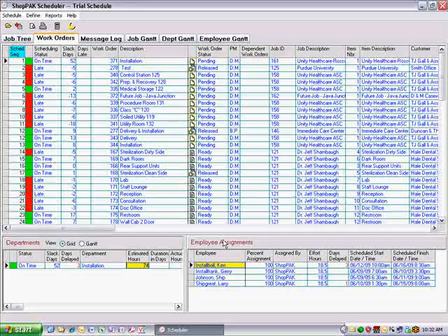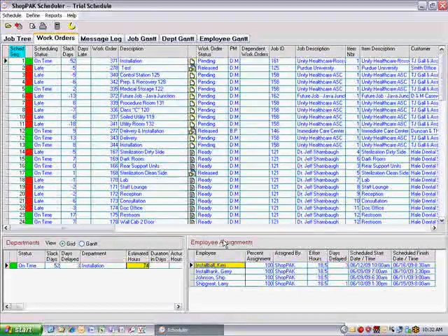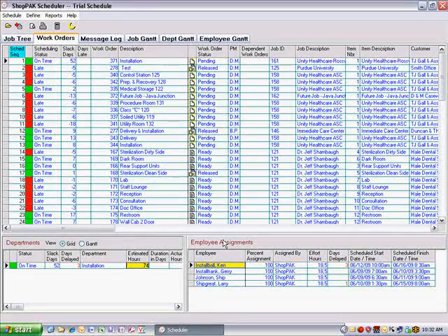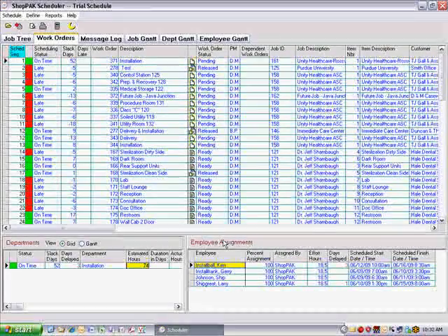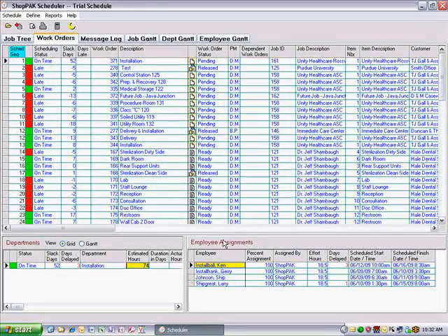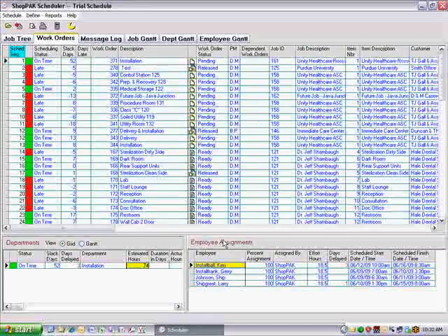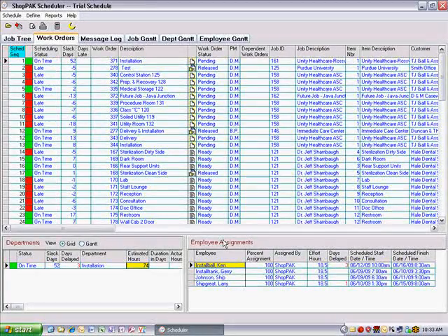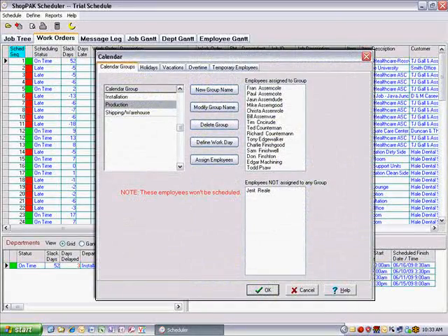There are two situations that terminate a scheduling request. 1. Calendar information is missing, or 2. Work order sequencing doesn't support one or more work order dependencies you've defined. The first problem is highly unlikely, unless you press the scheduling button before setting up your calendar information.